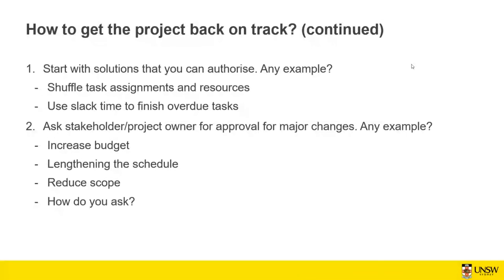And also there's another way of planned value, which is planned value for each task or for each work package. Then it's got its own planned value, which you can see when you are evaluating and doing the earned value analysis: what are the tasks that are supposed to finish and what are the planned values for those tasks, and then you can sum it up.